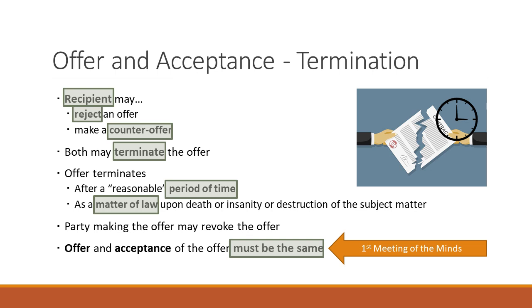So let me give you an example that I'm actually working on right now. I have a client that's building a very high-end residence, and it's multi-millions. When the contractor first came in, they provided a pretty detailed bid for the contract. But the contract was not ultimately signed right away, and there were some tweaks. The city came in and made some changes for codes and zoning and everything else, and so they had to change the price.